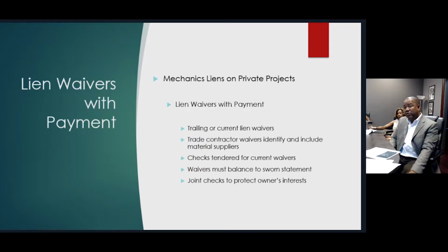In certain jobs, and I have had experience in this on the city side, as you saw from my background, I was the former executive director for the Public Building Commission of Chicago. On certain projects where we felt that the prime contractor may be on wobbly legs financially, the owner issued joint checks to ensure that the subcontractors were actually paid for work performed. That joint check is a way to protect the interests both of the owner as well as the subcontractors performing work on the project.